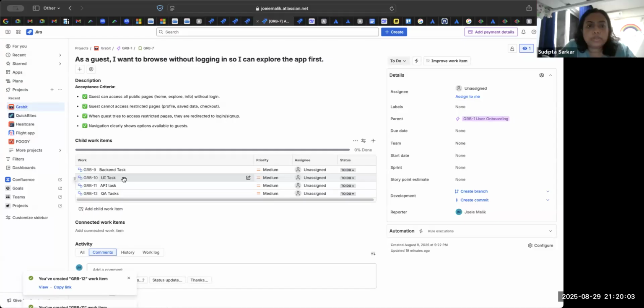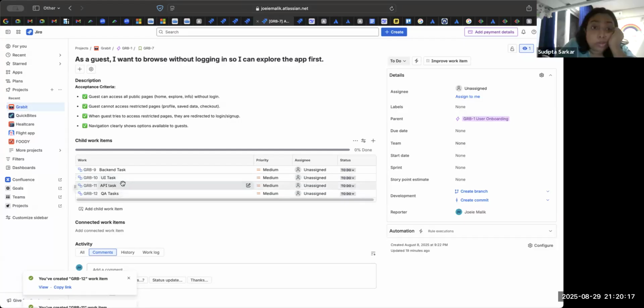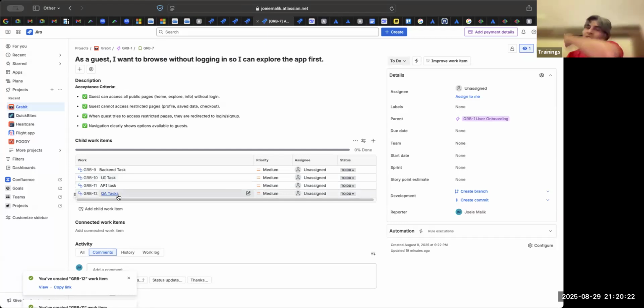So if I just create a QA story here and not include anything else, I'll say, oh, you complete the story, I have a separate QA story. I can do that, right? Okay. A lot of teams do it, right? You don't include the QA task here, you create another story for QA. That's not a good practice. Everything inclusive. So the team says, yes, everything included.